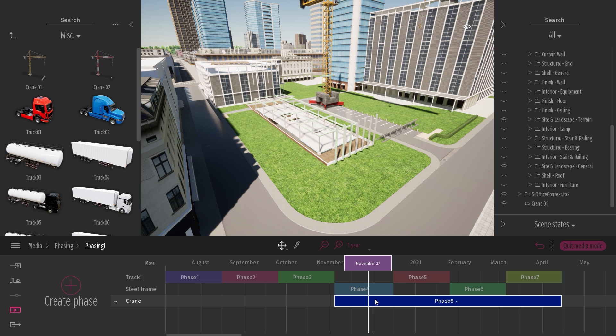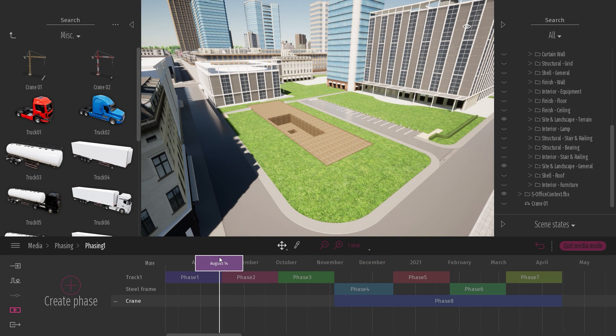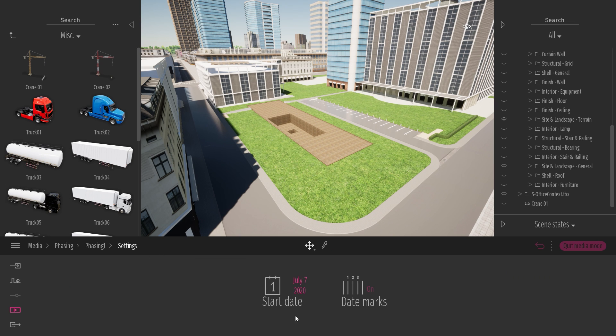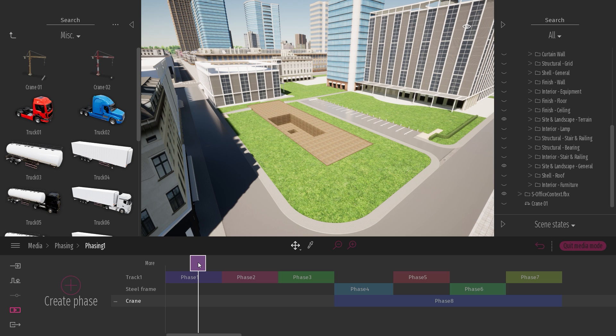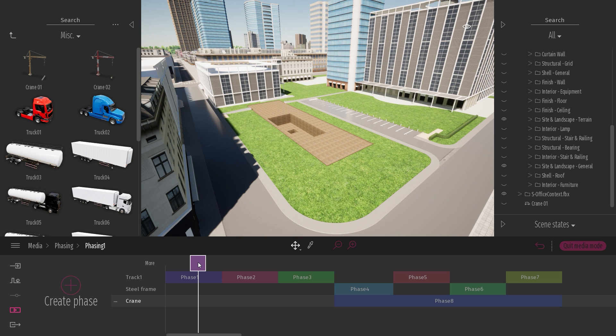So now I've created phasing. The phasing can be used like here to show the construction steps of a project. But if you click on the more, here you have two options. The first one is to select the start date of your construction project. But you can also disable the date. This will basically allow you to use the phasing tool in another way to show for example a variation of a project. So you can show different design options of your project, not something related to the time where you show the step of a construction. It's really you want to present multiple variations of your project. So you can have one phase for each design of your project and you can use the phasing tool to present the different designs.